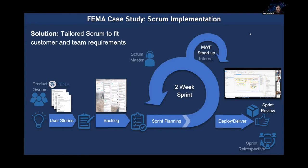At the end of our two-week sprint cycle, we have a sprint demo. We invite all of the contractors and subcontractors on our contract as well as the federal staff, and anyone can demo, including our team. We present visually with screen sharing, providing links and all that, showing the work that was completed during the sprint cycle. At the end of that meeting, we take any feedback or new priorities for the next sprint, then start back with backlog and sprint planning. It's very iterative.